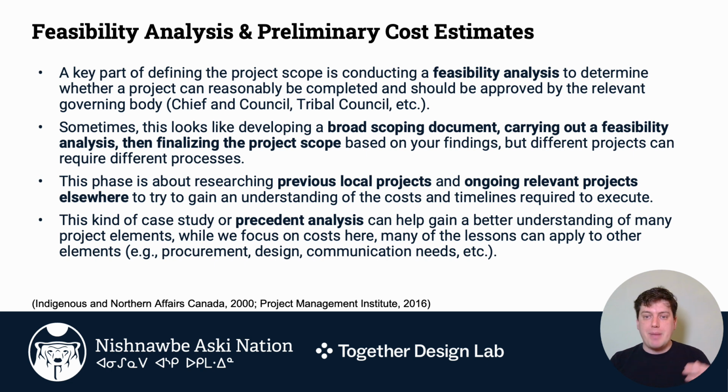So that's using past built projects to inform what it is you're looking to build. And those can be built projects that were built in your community or in communities that are nearby. And maybe you can get that information from folks at your tribal council or other technical supports that you use, or just through your existing professional network.